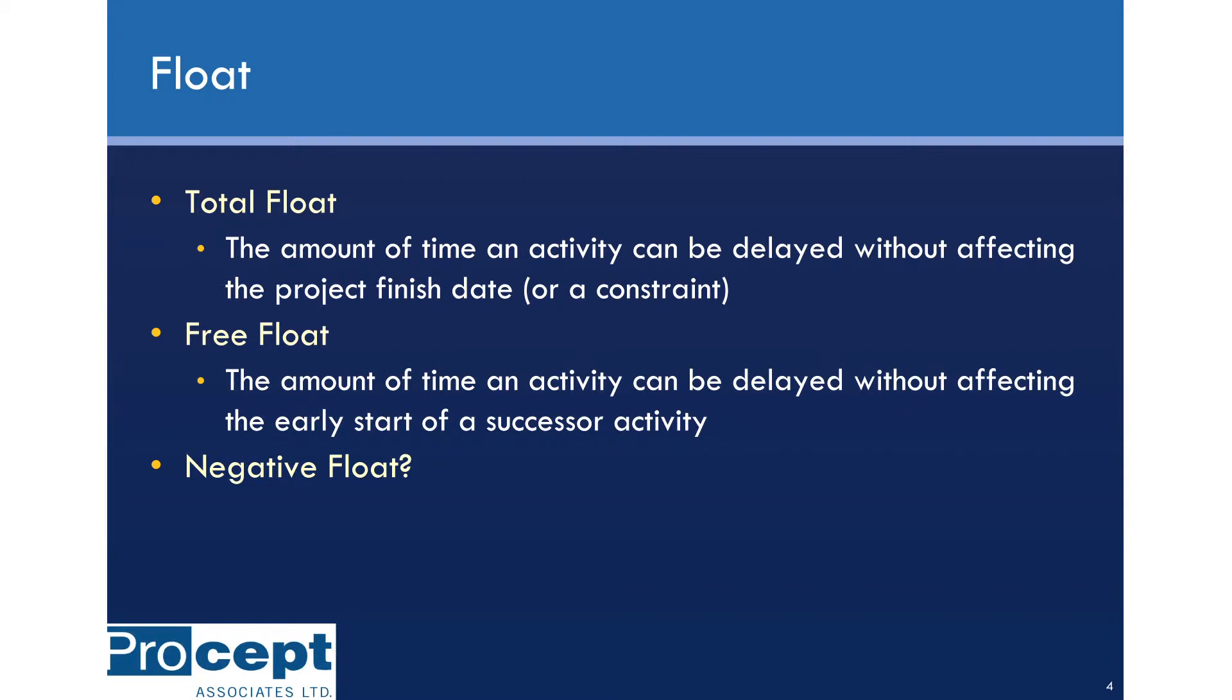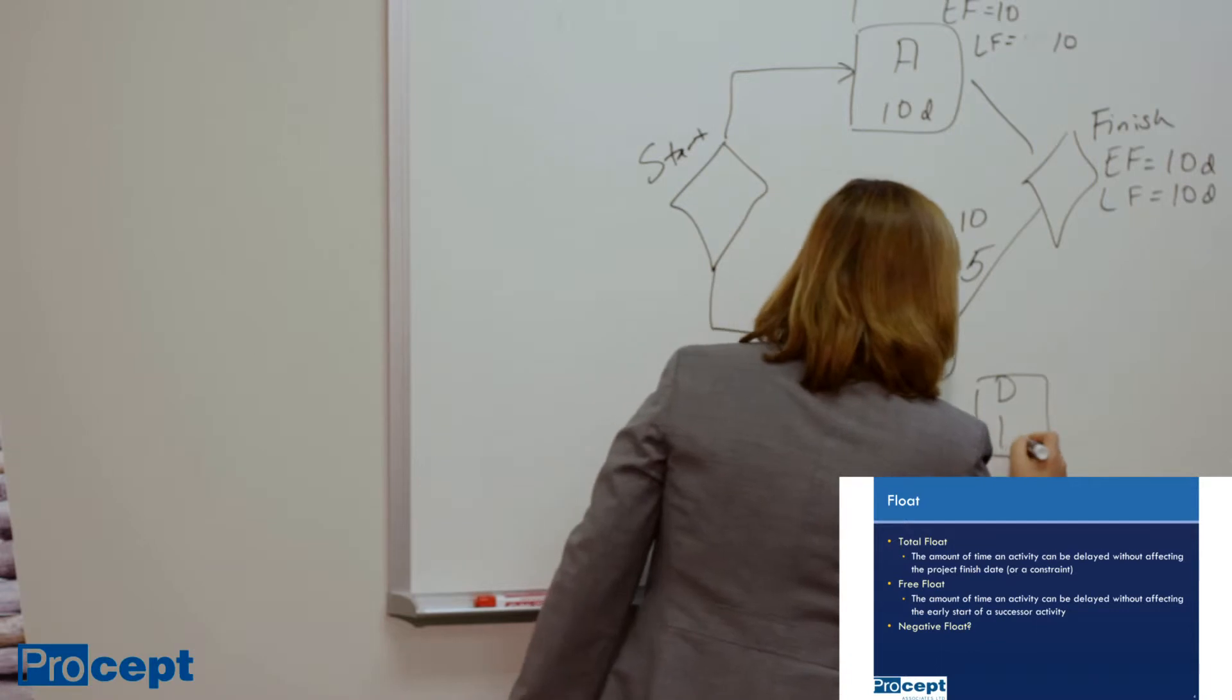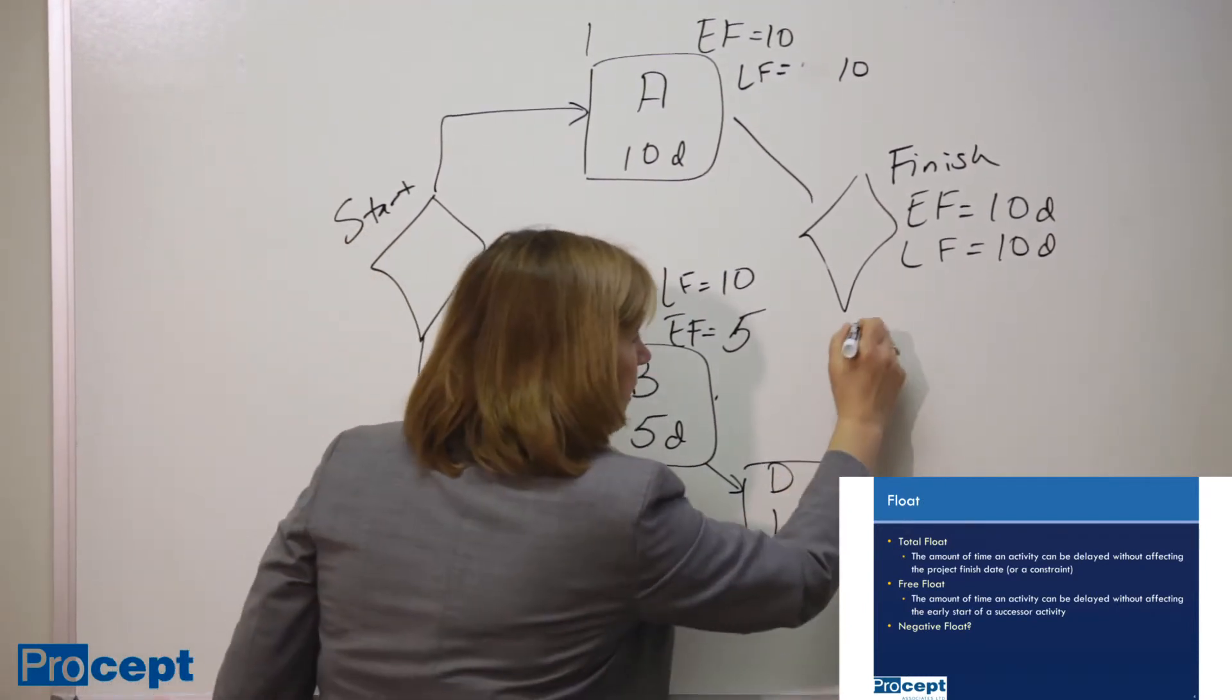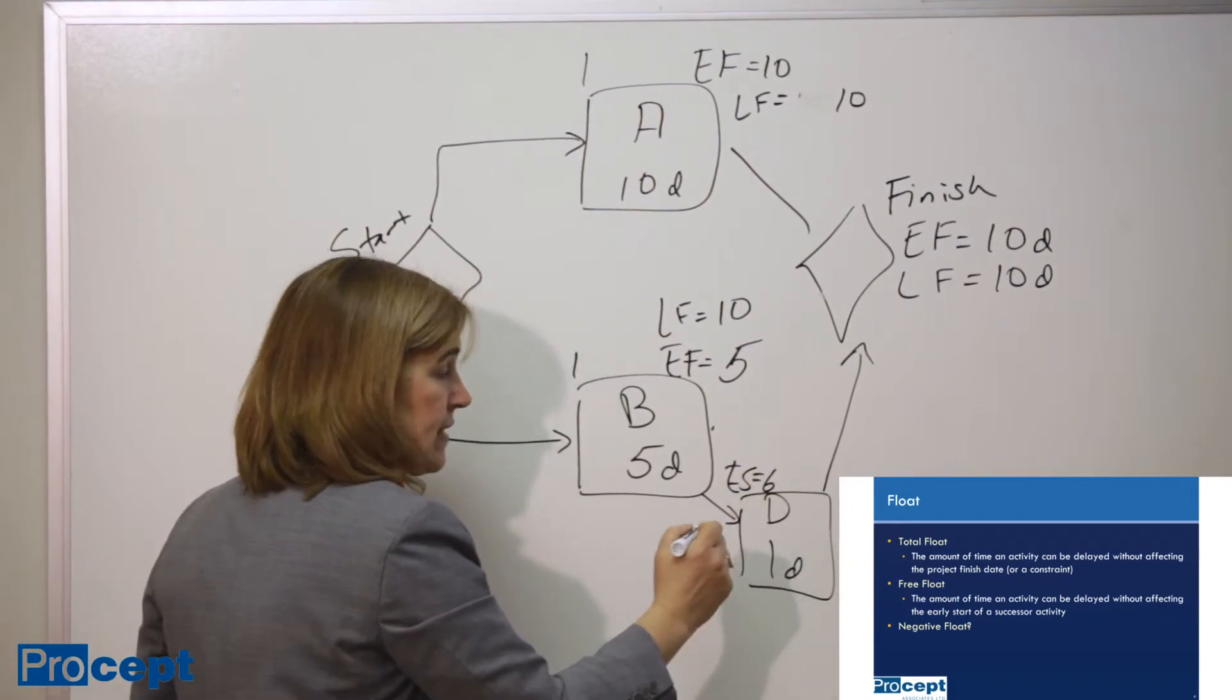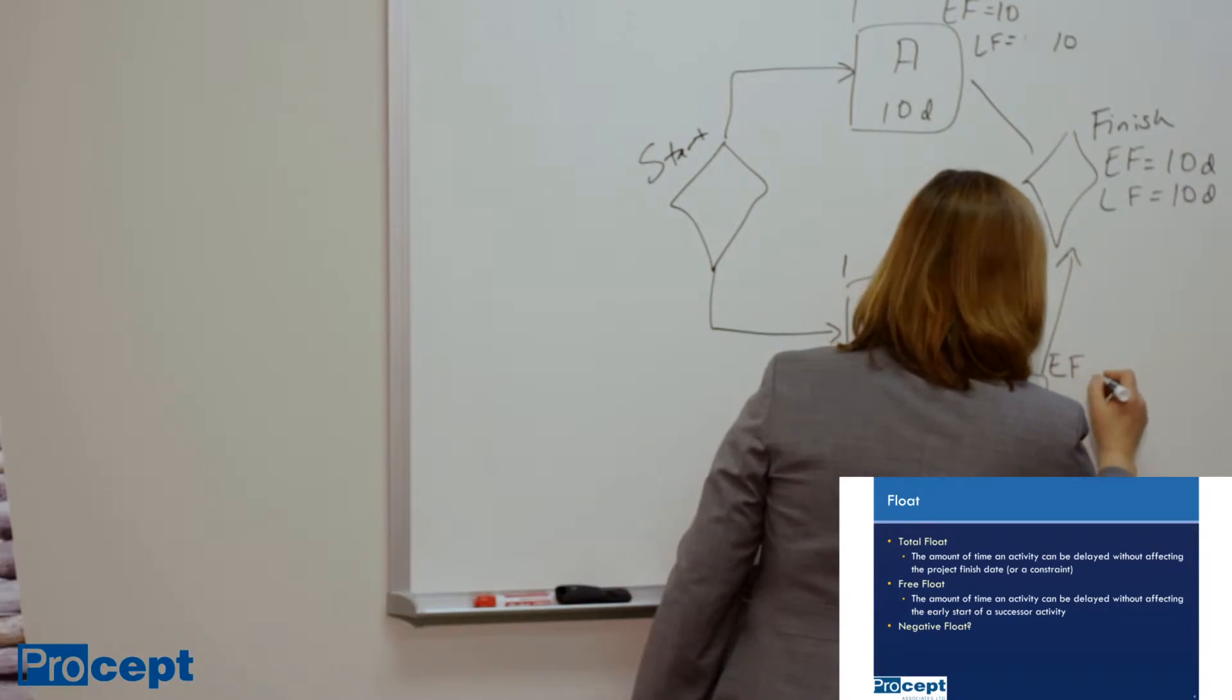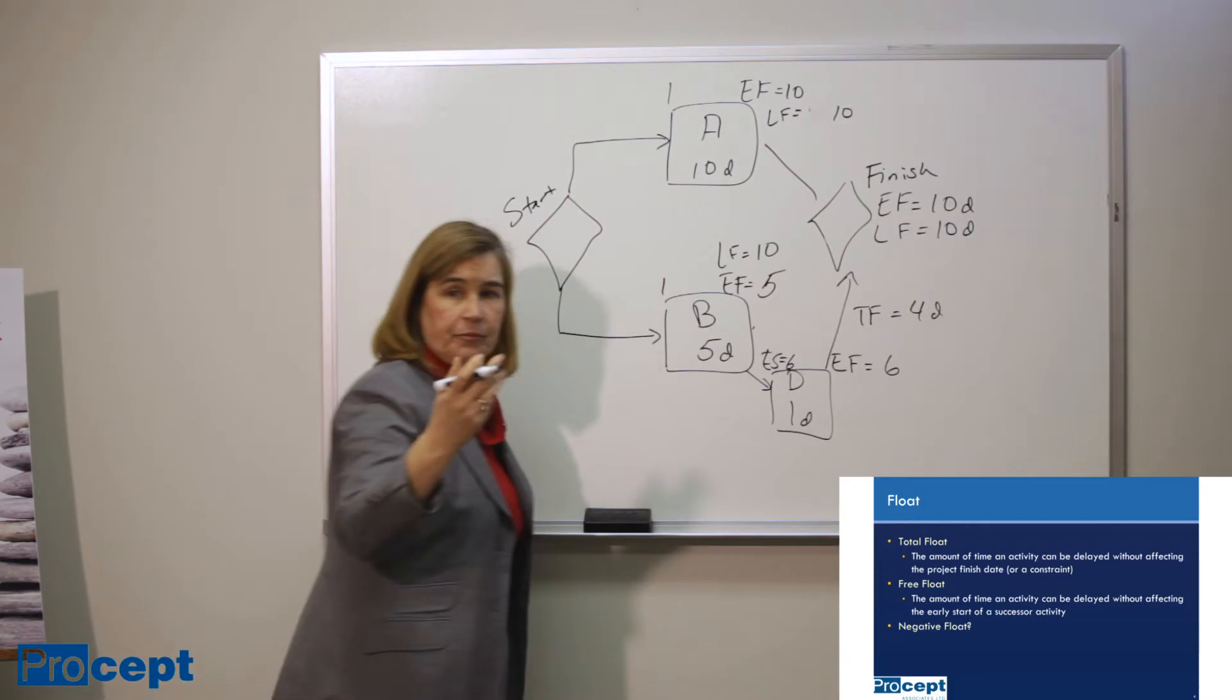Hence the definition of total float. Now, if we decide to add another activity, let's say activity D over here. And D is 1 day long. And we decide that we are going to start D after B is finished and then we can finish the project. We now have the earliest start time for D as being day 6. And of course the earliest finish time, it's a full day's worth of work, the earliest finish time for D is also going to be day 6. So now our total float on this path is equal to 4 days instead of the previous 5.